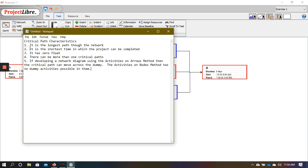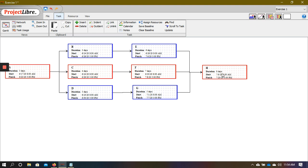Point number two of the characteristics of the critical path is that it is the shortest time in which a project can be completed. So here we've got path A, B, E, H, which is 22 days in length. If after 22 days of the project we check the progress, we will find that there are still some activities that are ongoing and the project is not yet completed. If we take the bottom path, which is 23 days, that means that after 23 days there would still be some more work needed. So basically, the critical path is showing us the minimum amount of working days necessary in order to complete the project.